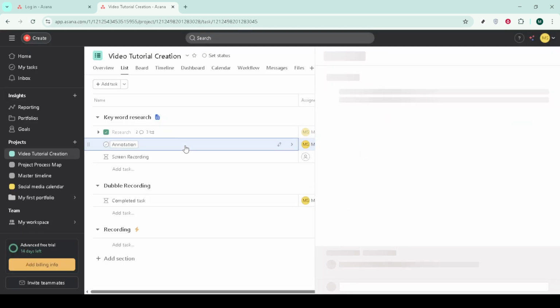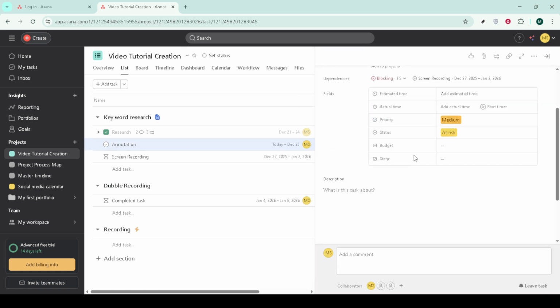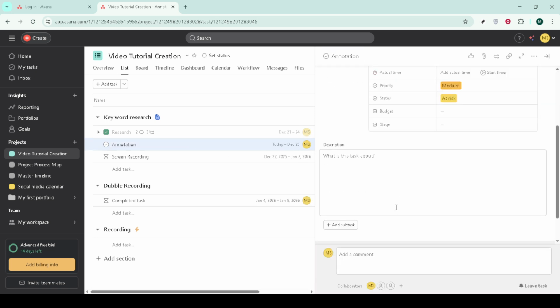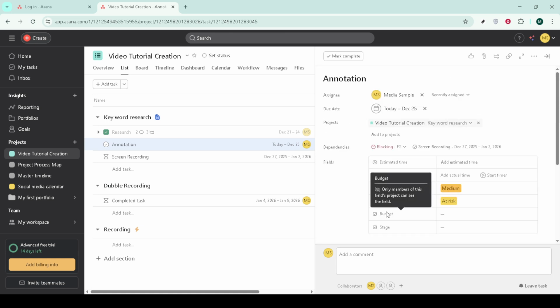Once you have the raw list, arrange the steps in a logical sequence. Call out dependencies, parallel activities, and any prerequisites. This is where gaps or overlaps begin to show themselves.